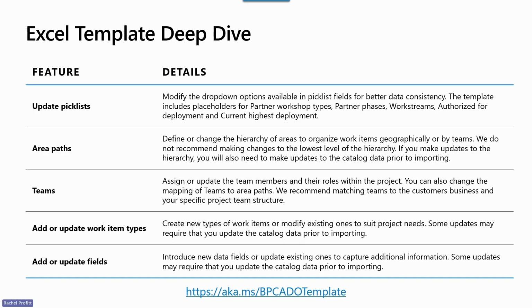The teams that we've created are actually quite detailed and pretty complex, and oftentimes are more complex than what you need for a small, simple project. And so if you are doing a smaller project, we would recommend that you delete the teams that you don't need, and then map the area paths to the condensed or smaller list of teams that you want to survive.